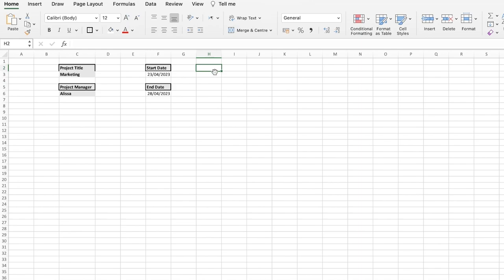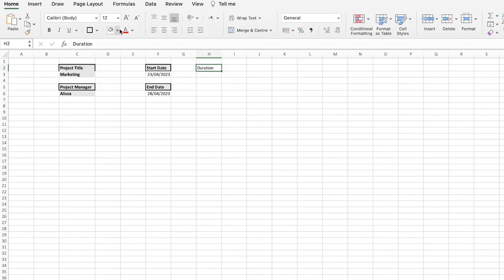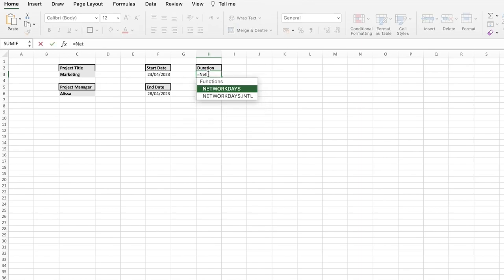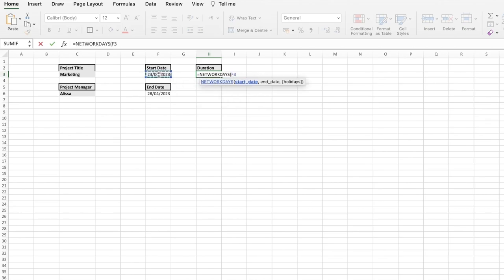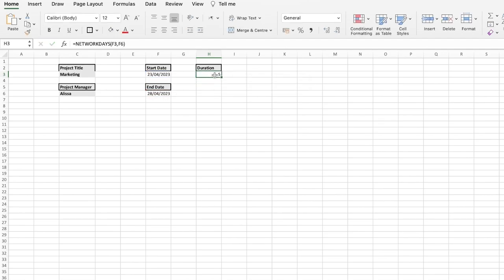A simple formula I like to use is for total duration. For a larger project it can be difficult to know how long it will be, so it's easier to have the duration calculated for you. You can type in =NETWORKDAYS, select the start date cell, add a comma, select the end date, and close the bracket. The duration comes out as five days. If you want to include working days only, you can use NETWORKDAYS and also enter any holidays that fall within that period.